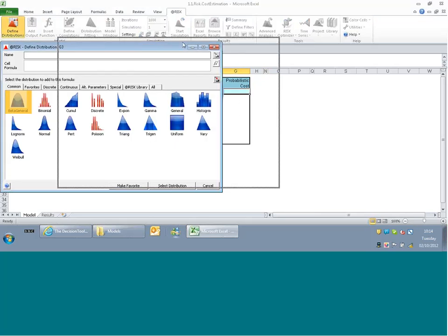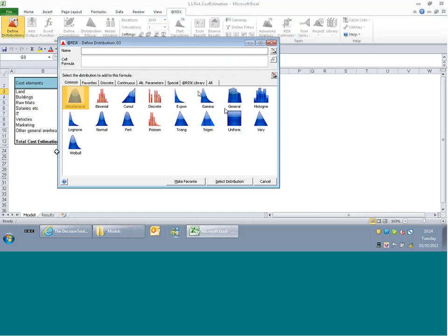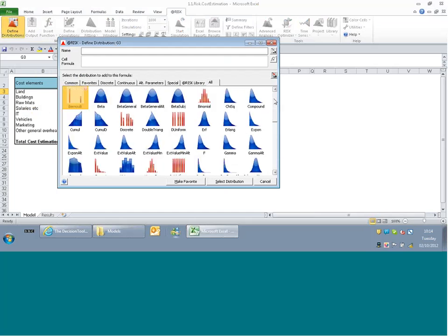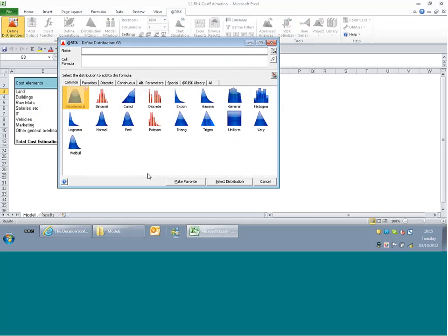And here we have what we call the distribution palette, where we have all the different types of distribution, with lots and lots of different types, which sometimes scares people. But typically speaking, the most commonly used, probably by 99% or more of our customers, are grouped together here. They're split into what we call continuous or discrete distributions, which I'll explain a little more as we go along. Essentially, the different types of distributions are used to generate different scenarios. So instead of being stuck in this deterministic or static world, all of a sudden we can have a very dynamic model where we show lots and lots of different scenarios.